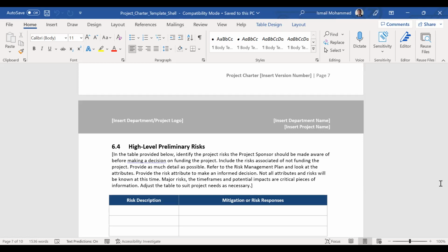And you do the effort estimation. Okay, sprint one I have completed, then you release my payment as per sprint one. And then the new requirements. Okay, this new requirement came, I put it into the product backlog, and this is my effort estimation. I'm going to deliver this requirement in sprint two.